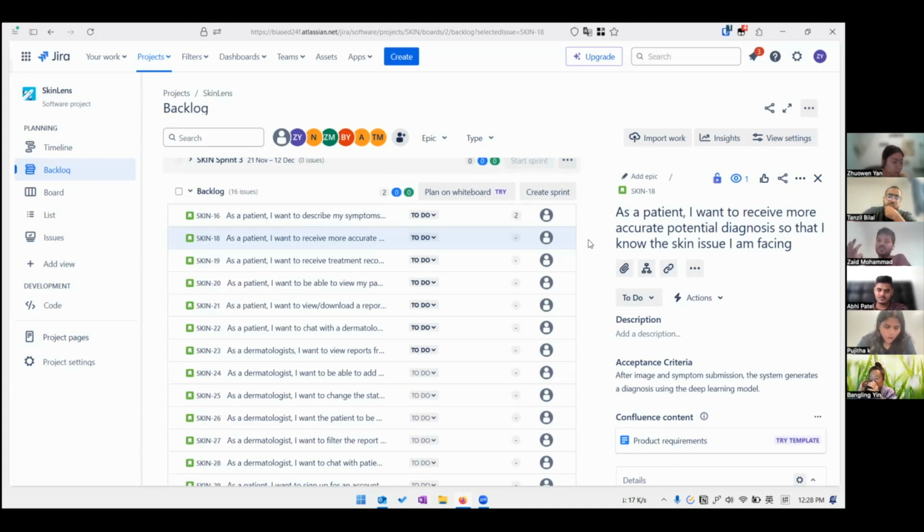If we take 3 sprints, on average it is 20 points per sprint. So from the entire backlog, 20 points can go into sprint 1. You need to assign points to every user story, and according to our capacity, we select the story points we can do in this sprint.